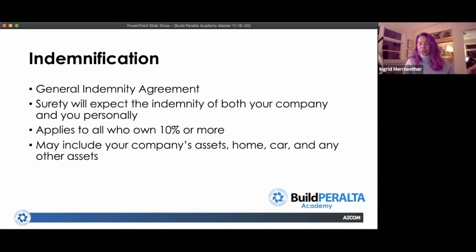And then, this is where there's a little crossover between bonds and insurance, because insurance covers construction defects, for example. That's the other reason why the warranty period is usually 90 to 120 days and no more, because you still have general liability insurance that would respond if there is a construction defect issue that's discovered, and there really isn't a time limit associated with that. Okay, next slide.